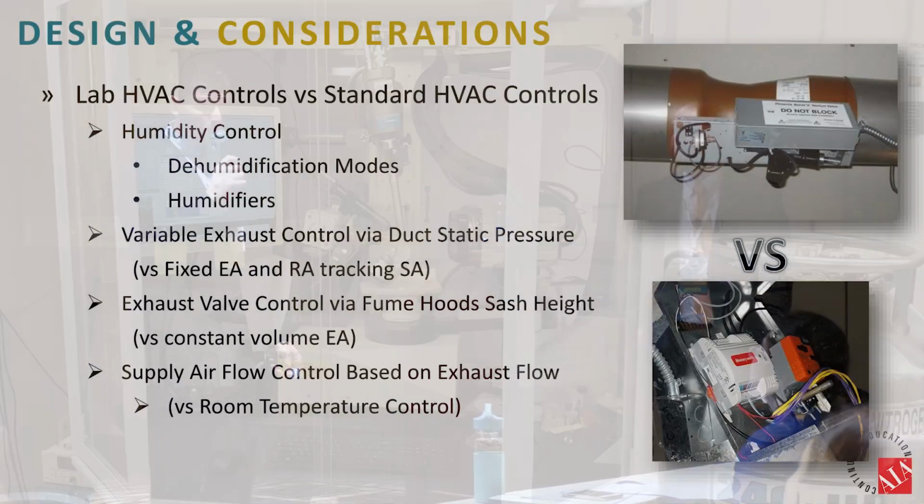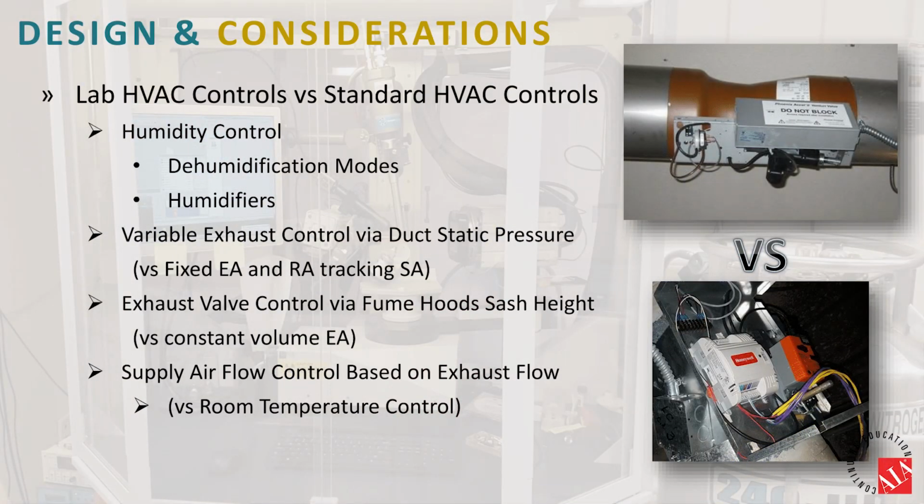And here's what I was just talking about with the valves versus the terminal units. One of the laboratories we went into to work on had a retrofit where the original air control was all terminal unit, all done by damper. And essentially all they had done was remove the pneumatic controls from the existing terminal unit, and they slapped DDC on top of it. Okay, well, we can make that work, but getting within that 5% tolerance is going to be very, very difficult. And so it took a lot of tuning and control work, and we had to clean all those airflow sensors they're trying to reuse. But that's that kind of thing that, they wonder why they're having problems, and it's a little bit obvious to us when we get in here and start doing this.